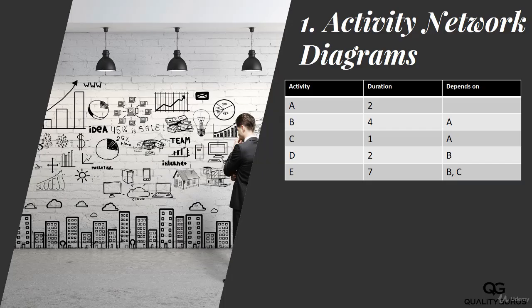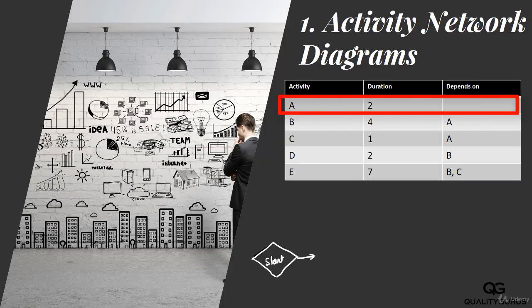Just like any project, you have a starting point and an ending point. So let's make a starting point here. This is my starting point, and the first thing I do is activity A. So this is my activity A, and let me put 2 days here, since this activity takes 2 days to complete.